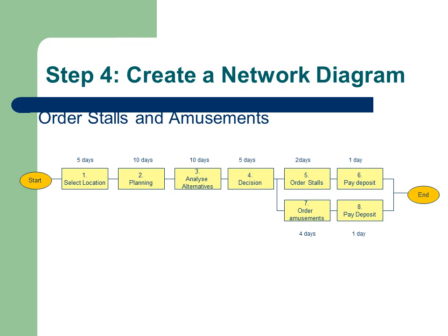If you write every activity on a post-it note and use a large whiteboard or even the wall of a meeting room, you will find that arranging activities into sequence is much easier and also more fun as it promotes interaction between the group. Remember that you should aim to do as many activities as possible in parallel in order to shorten the total duration of your project. Of course, you must ensure that this is logical and that you also have enough resources